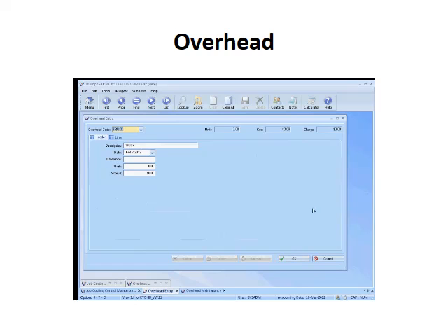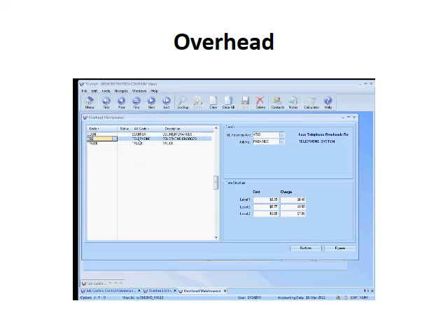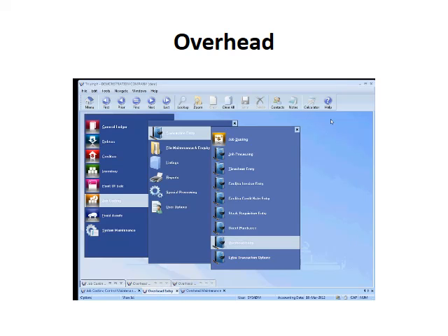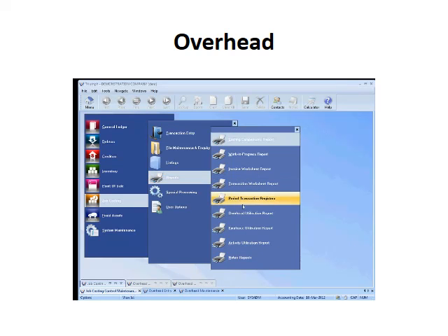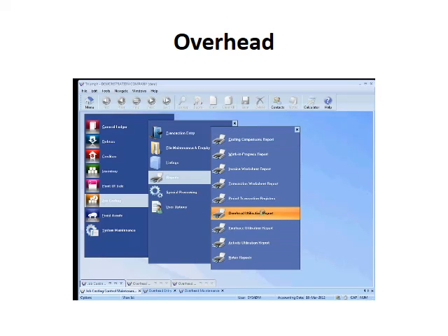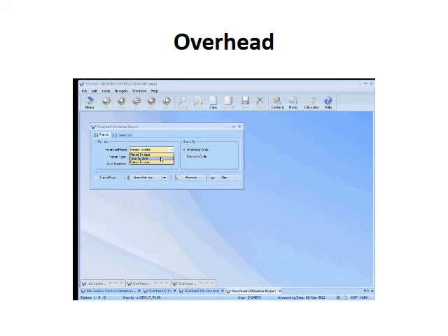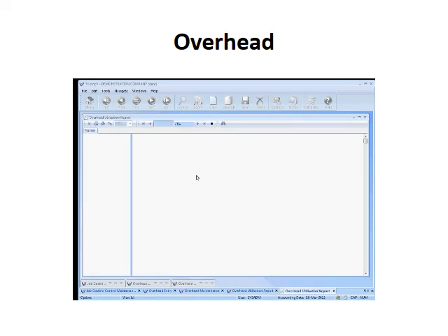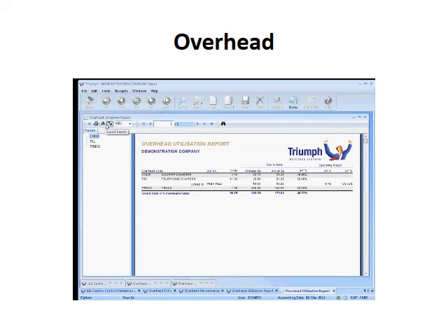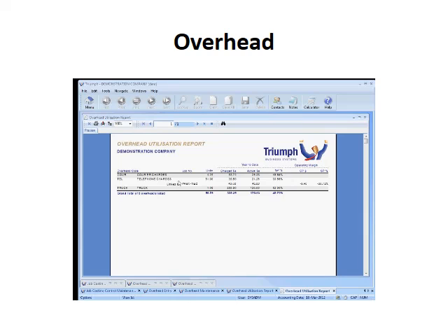So very simple process. One of the powerful components in here is the ability to actually link a cost center or an overhead area with another job. So if we look at the reporting that goes with this, it's very much used in a dry hire type environment, that if I run up a report, and minimize that so I can see this, you'll see that as this job comes through, it says my courier charges, I did $4.75 for the month. I charged theoretically $58. It actually cost me $29.